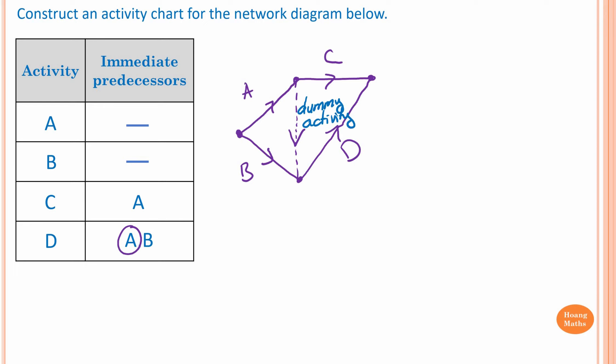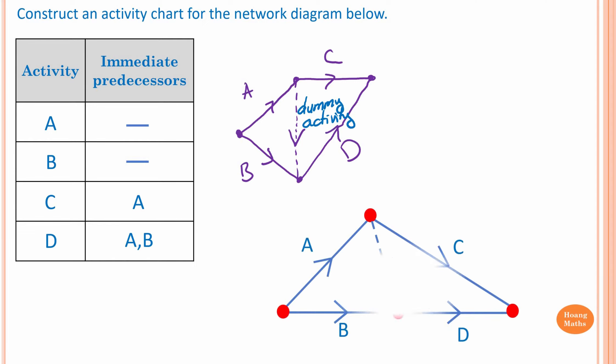So this is the network for this activity chart. You can redraw it to make it look a bit better. Don't forget: the dotted line means Dummy Activity. Please take note — a Dummy Activity always has a weighting of zero. Keep that in mind, because at the moment we don't have any weighting on this network.